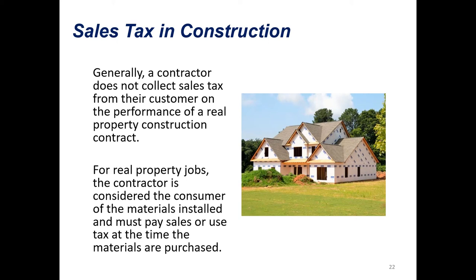Ryan laid the groundwork as far as the law for construction contractors. Now we're going to go into some more practical examples as a contractor and discuss everything he talked about in a little more detail. Generally, as Ryan said, a contractor does not collect sales tax from their customer on the performance of a real property construction contract. For real property jobs, the contractor is considered the consumer of the materials installed and must pay sales or use tax at the time the materials are purchased. This is a typical real property construction contract for a home builder—if you're a contractor hired to build a home, you're paying tax on the materials.